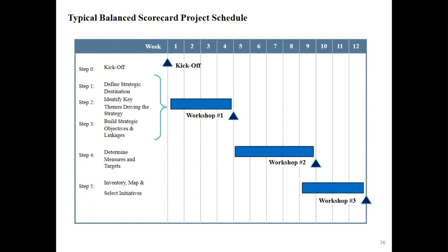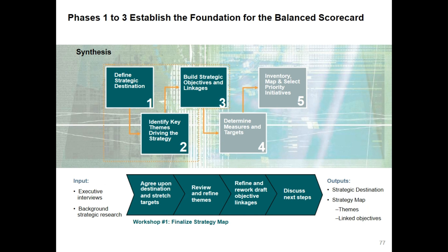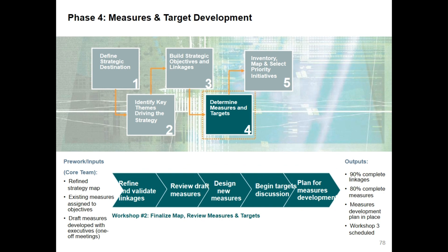Phases 1 to 3 establish the foundation for the balanced scorecard. Workshop 1 finalizes the strategy map; inputs are executive interviews and background strategic research, and outputs are the strategic destination and strategy map. Phase 4 is for measures and target development; inputs are a refined strategy map, existing measures assigned to objectives, and draft measures developed with executives in one-on-one meetings; outputs are 90% complete linkages, 80% complete measures, a measures development plan, and Workshop 3 scheduled.